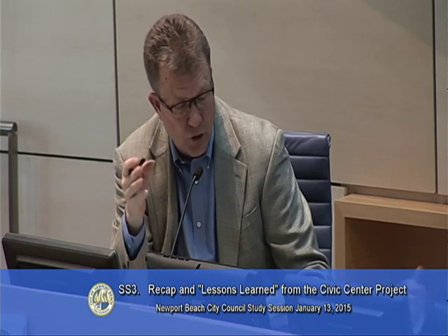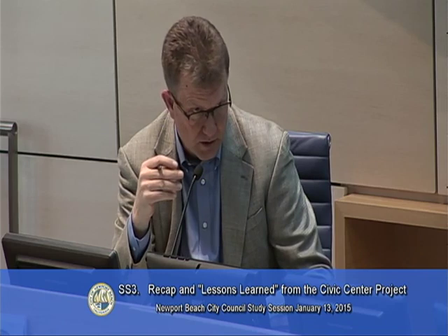It just seemed to increase. Like Councilman Curry said, I call it scope creep, but he said we expanded the scope. We expanded the library. The original Measure B proposal was just to reorient a secondary entrance. We added 17,000 feet to the library. So we had scope creep. Our park is now a fully developed park. It originally was supposed to have an amphitheater and be a more usable park, although not have active ball fields. Instead, we have a couple of sidewalks, riparian wetlands, and a couple of viewpoints, and I know everybody wants to say, and bunnies. We also have an emergency operations center.